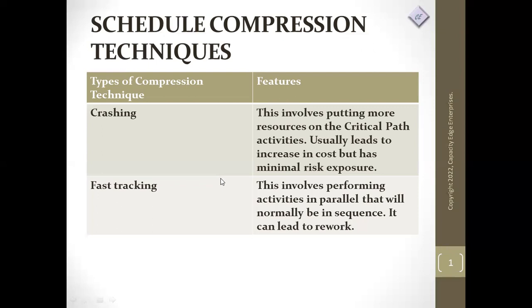So the drawback of crashing is it usually increases cost because we end up spending more in getting more resources to focus on critical path activities. Then we have fast tracking.